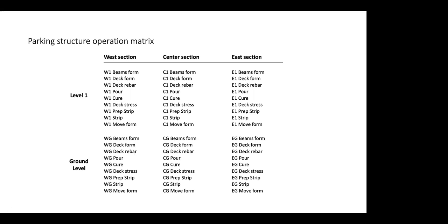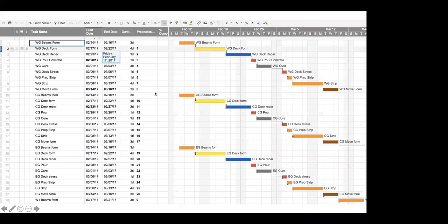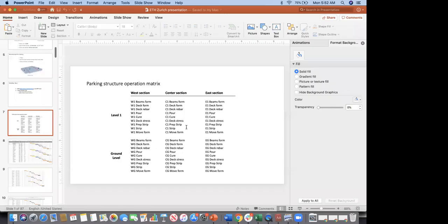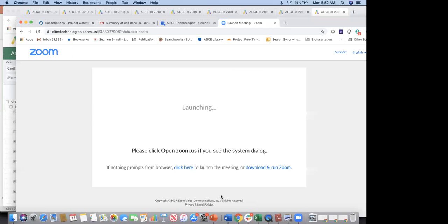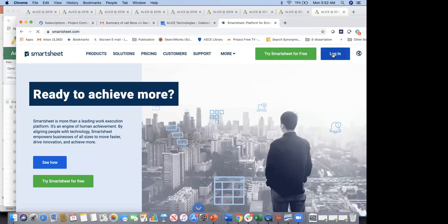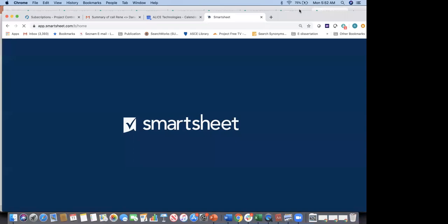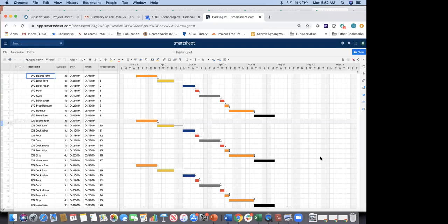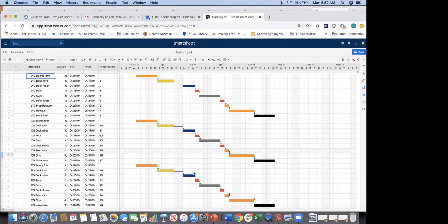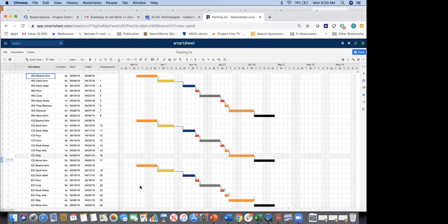You give this to your scheduler — and you can really use any scheduling tool, they're really all the same — and they'll create a schedule. Beams formwork, decks formwork, pour, cure, stress, prepare, remove formwork, and so on and so forth. You can see that fragment repeats itself. The last thing we did is color-code it based on the resource type, the crews you're using. The beams formwork needs a beams crew, the deck formwork needs a decks crew, steel tasks need a steel crew, all the masonry tasks need a concrete crew.